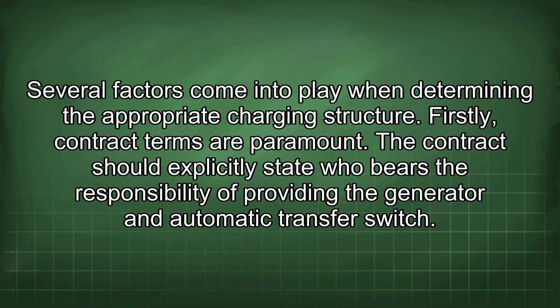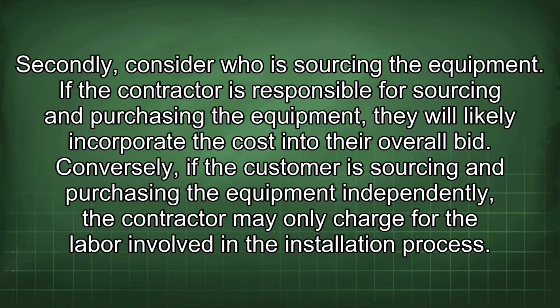Firstly, contract terms are paramount. The contract should explicitly state who bears the responsibility of providing the generator and automatic transfer switch. Secondly, consider who is sourcing the equipment. If the contractor is responsible for sourcing and purchasing the equipment, they will likely incorporate the cost into their overall bid. Conversely, if the customer is sourcing and purchasing the equipment independently, the contractor may only charge for the labor involved in the installation process.